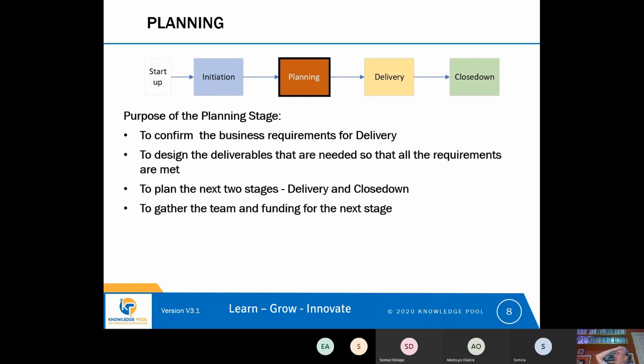That second project will select the next CRM that's going to replace the first CRM, migrate all the data from the first system to the second system, and do the training on the second system. It's clearly an inefficient process, but if the requirement is important enough to achieving those outcomes, then that could be the right decision.